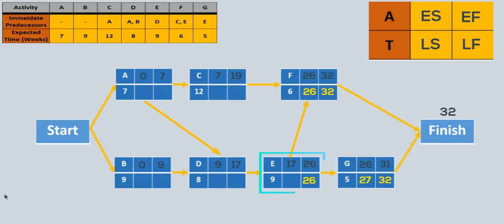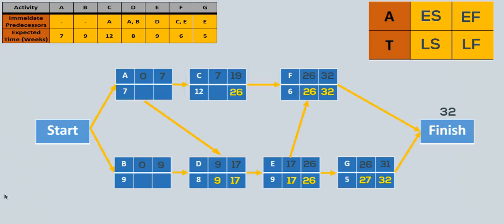Thus the latest start time for E will be 26 minus 9, which gives 17. D has only one successor E, so the latest finish time for D will be 17, and the latest start time will be 17 minus 8, which gives 9 for D. Activity C also has one successor F; therefore C's latest finish will be 26 and latest start will be 14. A has two successors, C and D, and the minimum of their latest starts is 9. So the latest finish for A will be 9 and its latest start will be 2. Activity B has one successor D with the latest start of 9. So the latest finish for B will be 9 and its latest start will be 0. Here we have completed calculating the backward pass.